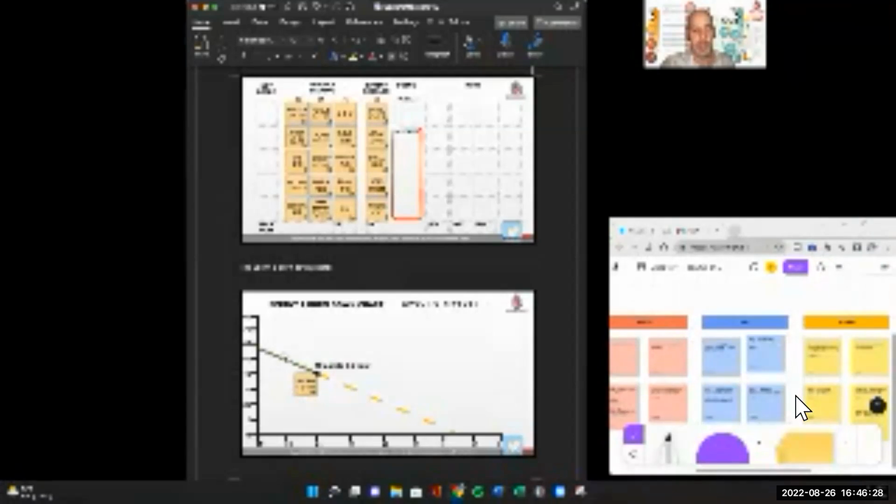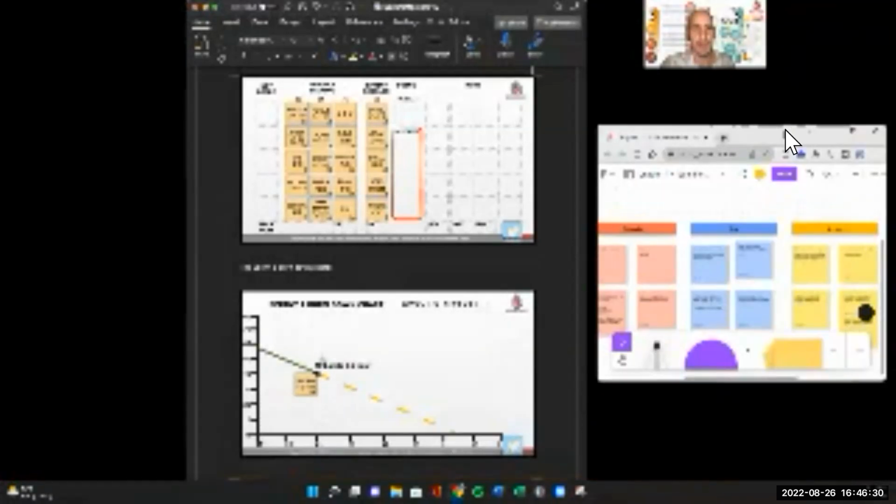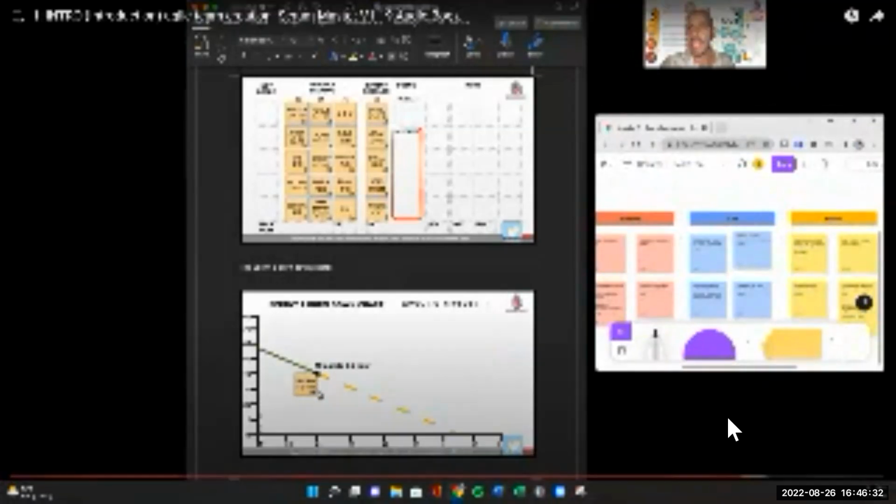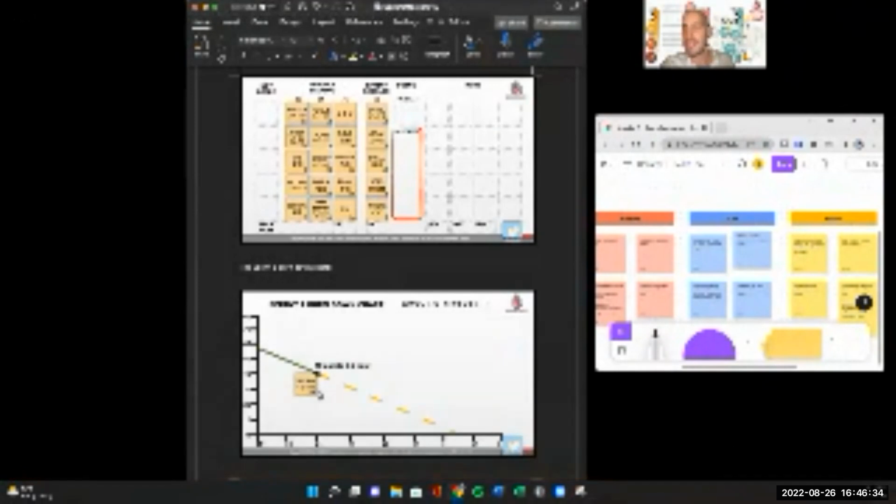Here's the entire course backlog, or it was at the time this book was first written. It's actually significantly different now. And here's the Sprint 1 burn down chart. In this example, we're an hour into a class that started at 10 a.m. and we finished introduction, which was worth 18 points in estimation. Now, we haven't done estimation yet as a class. We'll do that later. It looks like it's going to be after lunch at the current trend.